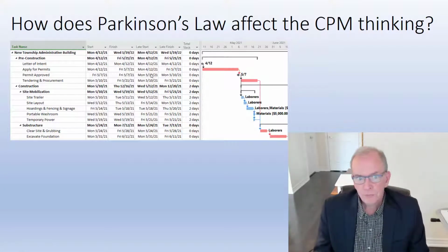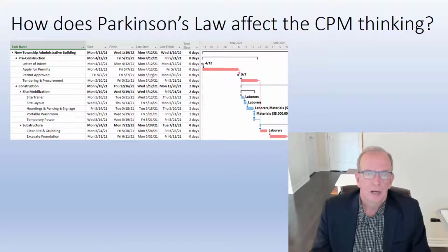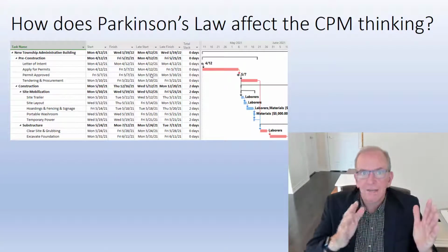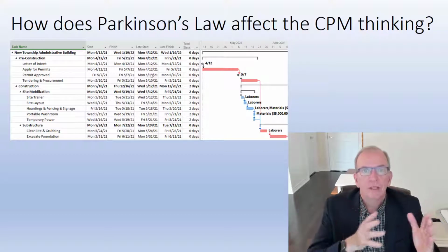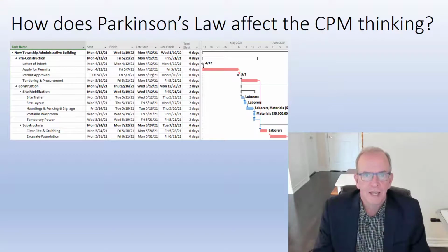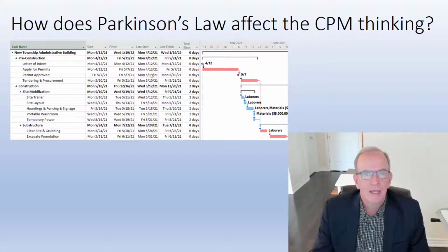So when you think about that, if you've got a task that needs to be done and you give it to your plumbing subcontractor and they have been allocated 10 days to do it, but it should only take them 7, it's probably going to take them at least 10 days, because they're going to start 3 days into it and then the 7 days will take them up to the completion date. That would be all well and good, but the other problem that occurs is very often during that 7 days, something happens that prevents them from finishing it on the 10th day. So that extra 3-day buffer that you gave them, it's not going to have the intended result.